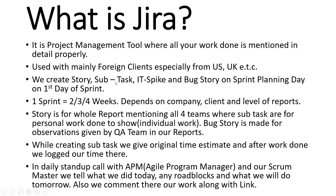Then what is a subtask? In the subtask, personally, for example if you are a BI developer, your personal subtasks are created. For example, connecting with the database team and understanding their view or stored procedure — that subtask is created and you mention two hours needed for that work. Again, creation of the Power BI or Tableau report — you say you need three to four days. Then there is an internal and external review with your team, for which you create one more subtask and say you need three hours for that.